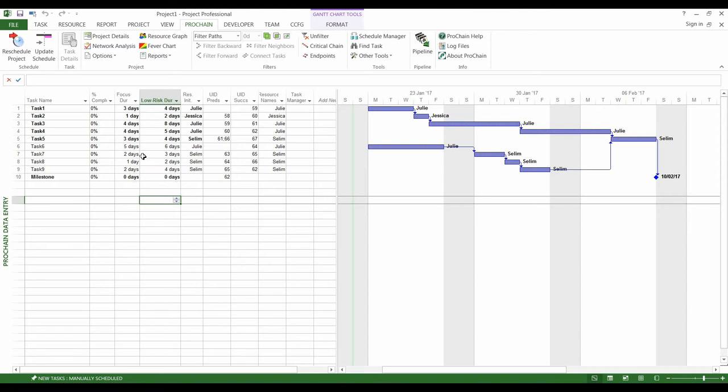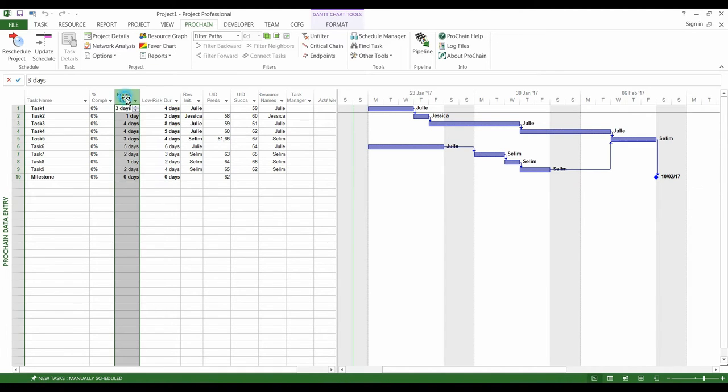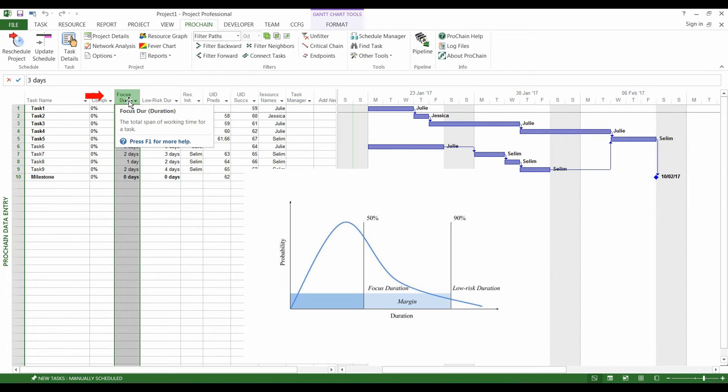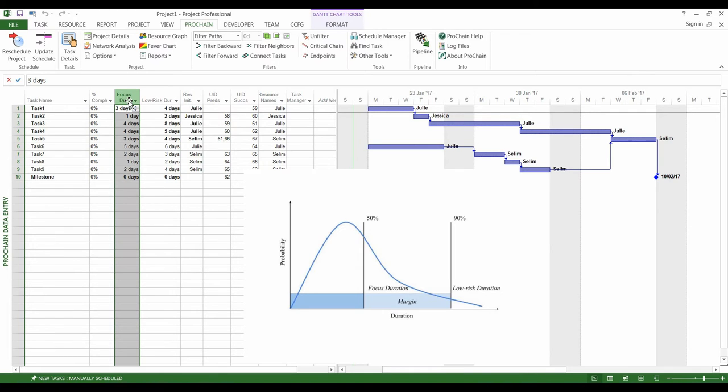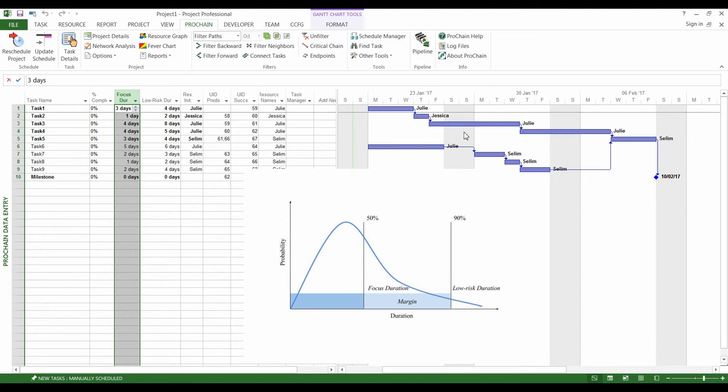The first duration to estimate is called the Focused Duration. It is the duration that you only have 50% of chance to respect, so it is an ambitious duration that does not include a contingency time. It is the duration you need if everything works fine with good working conditions. These focused durations are the ones displayed in the Gantt chart.